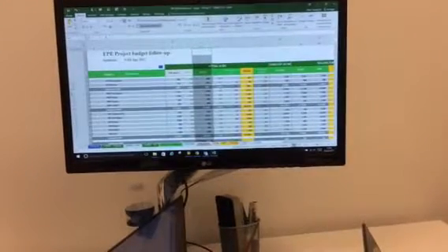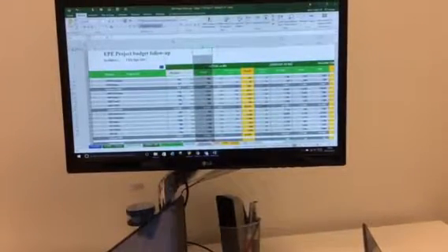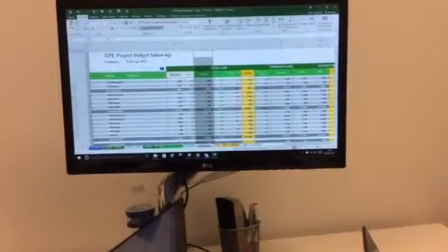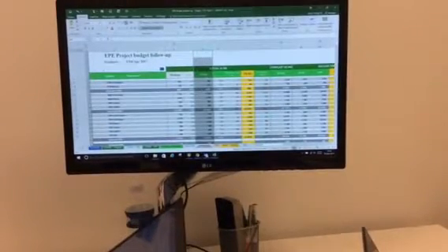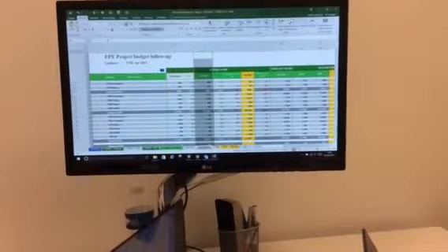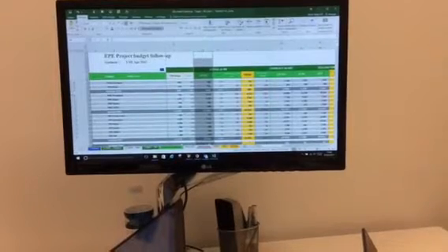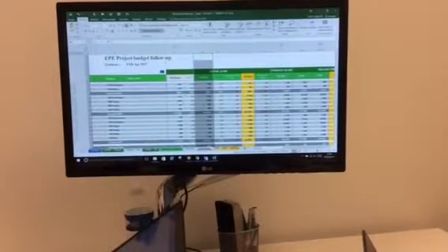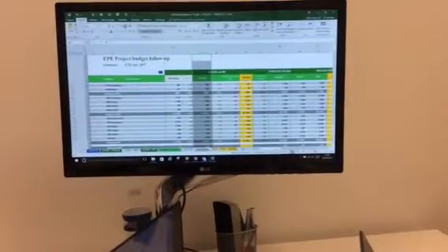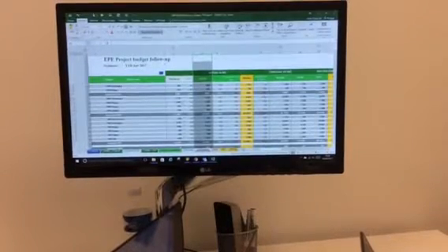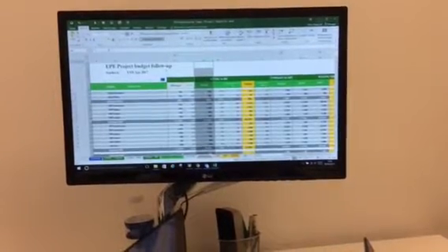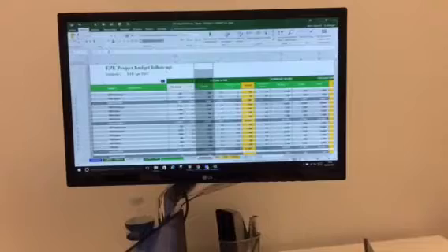It is used first by the project managers to take into account on the requests for the resources they use for their projects, and secondly, they have the forecast on their expense. When we talk about the cost of the project on OPEX, we have 2 parts. Either is it the cost for the resources working on the project, and second one is the expense, like the prototypes, the tests, something like this. So it is the main 2 parts which we check on the OPEX project cost. Otherwise, here in my report, we don't try to check the CAPEX.